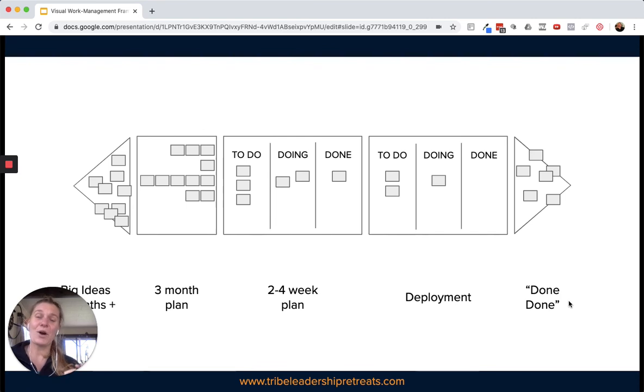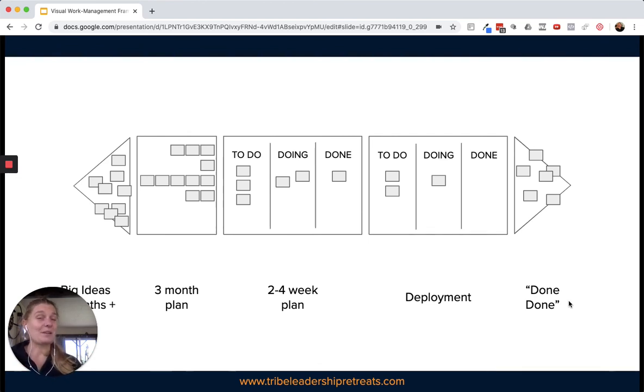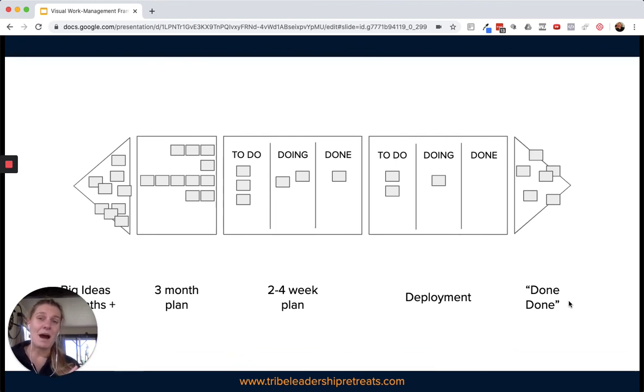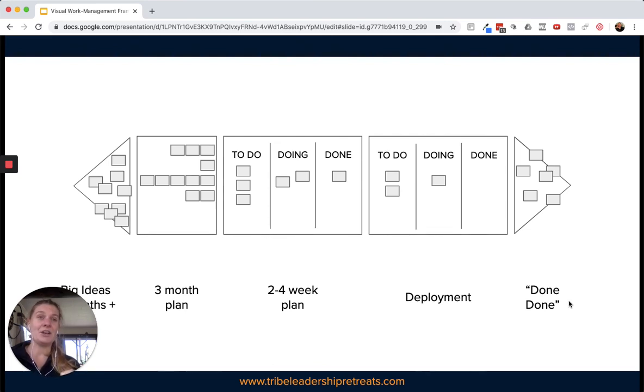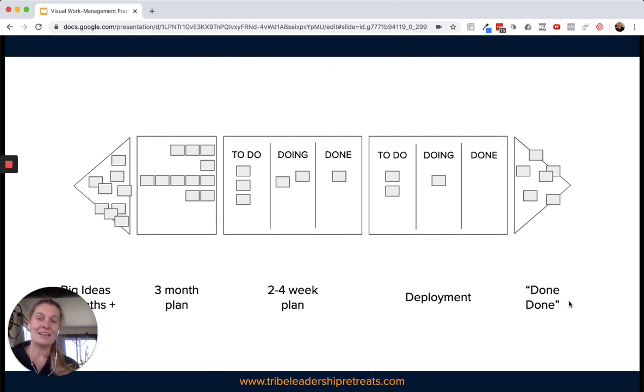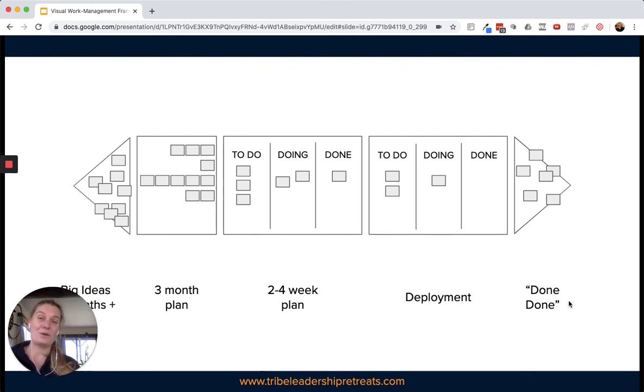Overall, the entire process with this team when we started could take three to six months for something to go all the way through. By the time that we'd finished, I think the shortest time we had for a piece of work to go through the wall was two weeks, because part of what this framework did was it highlighted when things were waiting in line. People got frustrated if things didn't move, so there was a whole bunch of process improvement that just happened in the background and consciously by the team to improve things like the deployment process, to get really clear on the work before we started it, and that meant that flow improved over the life of the program.